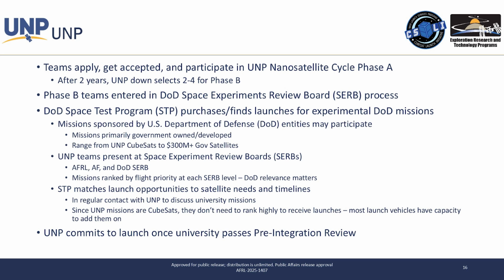So overall, pretty similar. The main difference is you're moving, outside of UNP directly, into this STP process, but we are helping you and guiding you and supporting you all through it and doing a lot of the interactions with them for you, because we work with STP all the time. And then, UNP will not actually commit to those launches until the teams pass the pre-integration review. And that's because we want to make sure that you have a mostly functioning satellite. We want to have a lot of confidence you'll get there before we commit to that launch.